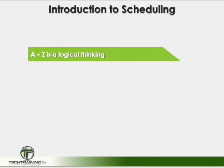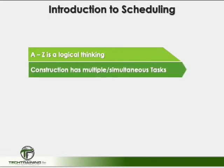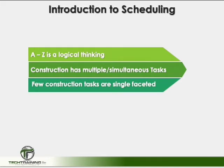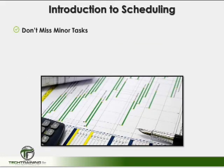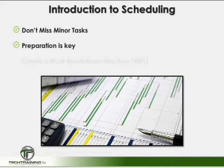Now let's talk about the nitty-gritty. When using any of these schedules, it is logical for a constructor to think A to Z — it makes sense, it's logical, it's easy to follow — and it's also a mistake. Most construction projects consist of a lot more than a single task, and even when working on a single task, there are other tasks that can be running concurrently. The schedule must be completed without leaving out any major or minor tasks, and the best way to guarantee this is to prepare the schedule in a systematic manner using a work breakdown structure, or WBS.